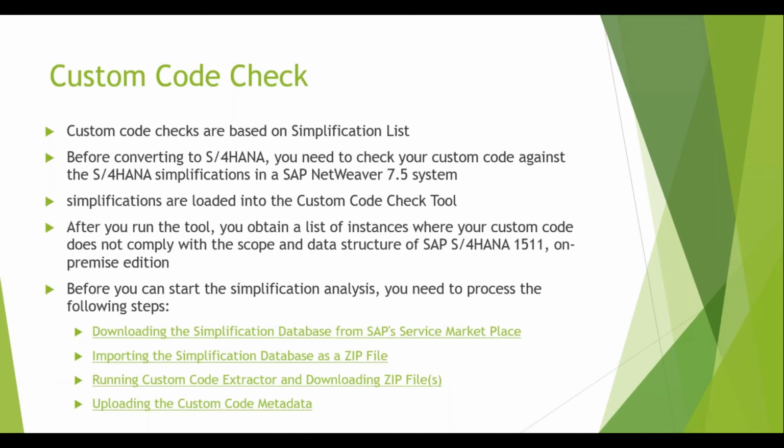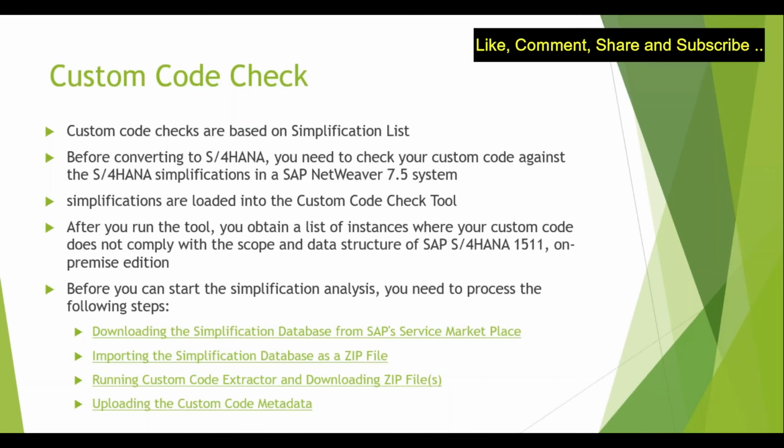See, I'll tell you how you will do it. First of all, you will copy the production system into a test environment without any transports. You will perform the test migration completely, an end-to-end migration, to get a feel for whether everything is going fine or not. Once you are comfortable, you will start with the development system and upgrade it, because after the installation you also need to perform the Delta configuration. This Delta configuration you cannot do directly in production. Delta configuration has to go from development to quality and then to production. So first you upgrade your test system, then your development system, then the quality system, and finally the production system.